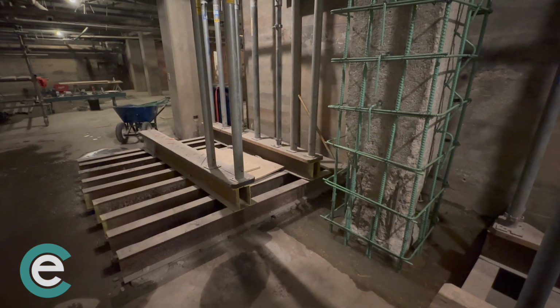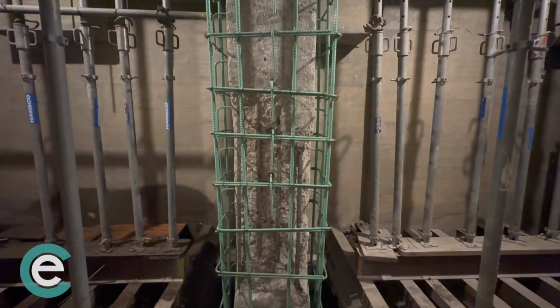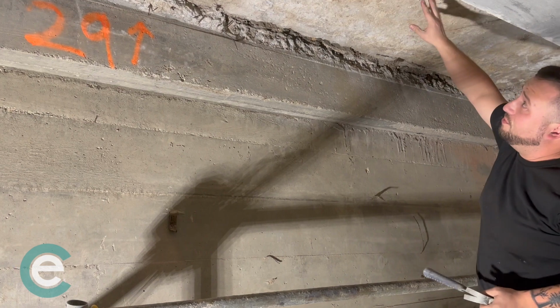While we were in the midst of doing the architectural drawings for the work that would be contracted out, we discovered that the foundation in the basement that supports the Hall of Springs, where the water bar is, was failing. So we were able to divert the money that we were going to spend on the exterior facade and the tower and spend it all in the basement on the foundation. And we found more failure under the water bar floor than we originally knew existed. So all the money is going for structural life safety improvements.